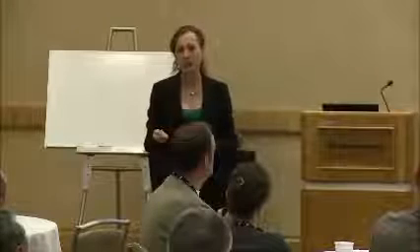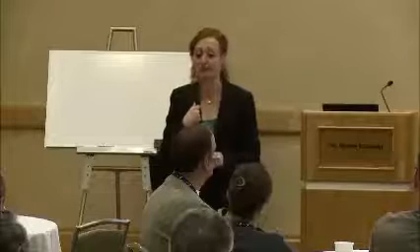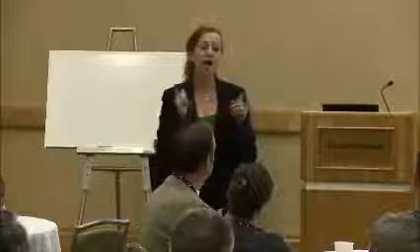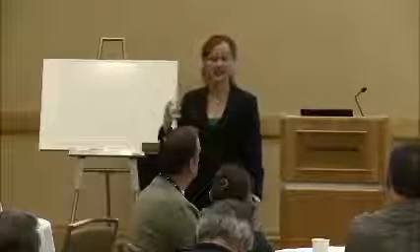I certainly like to be quite disciplined in my selection of words. If I say I'm writing a risk assessment, I would very rarely do just a risk assessment. But I would very often develop a risk management plan, where we're looking at the whole situation, scoping it up, identifying the risks and measuring them, but then saying this is what you can do about it to reduce it, these are the resources you need to spend, and if you do this in 6 months, hopefully you'll achieve a reduction. You need to brief this person, engage with that person, map it out, track it, come back and report it. So I would very rarely just do a risk assessment to identify and measure and leave it at that.